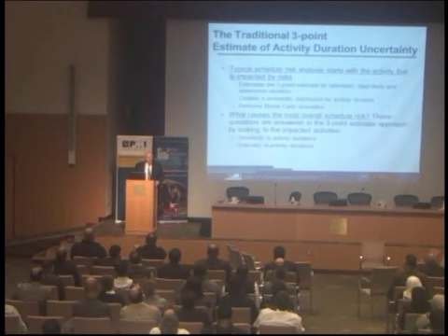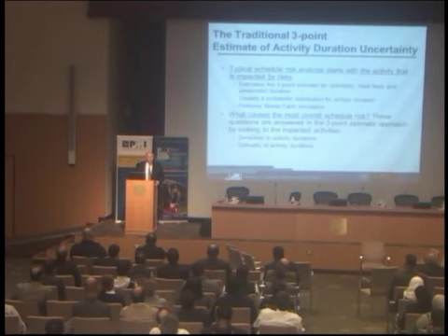What we use 3-point estimates for is inherent variability, but all the risk events that you identified in qualitative analysis and put in your risk register are actually entered into the quantitative Monte Carlo simulation software, using those risk events themselves, namely the root cause drivers, the root causes of those 3-point estimates we used to use.